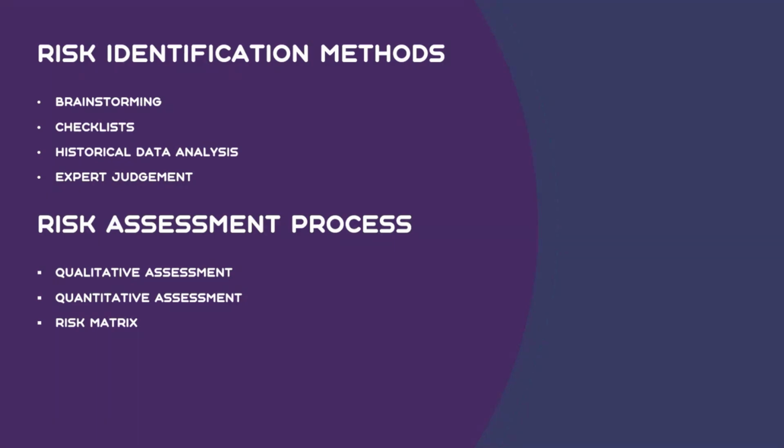That's the only thing. Whereas in quantitative analysis, you put a figure against the risk, and when you get a figure, only then you put a rank against the risk. I'm sure it's confusing. Let me put it this way. So, budget overrun issue. There are two criteria: chance of occurrence and severity. This is the main criteria for ranking the risk in quantitative analysis. As I said, in qualitative, we'll put high risk, medium risk, that's it. But in quantitative analysis, we need a figure.